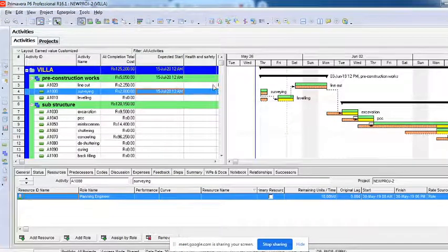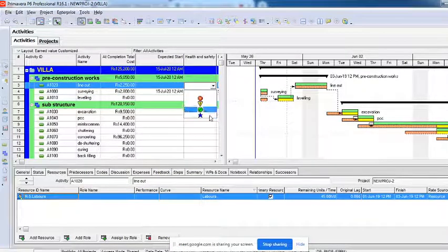Now you can see these are some of the symbols. Now the question is, can these symbols be customizable, or can we add anything to this? The answer is no. These are the default symbols or indicators that we have, and you will have to make a legend to make them understand what you mean by this red, yellow, green and blue.